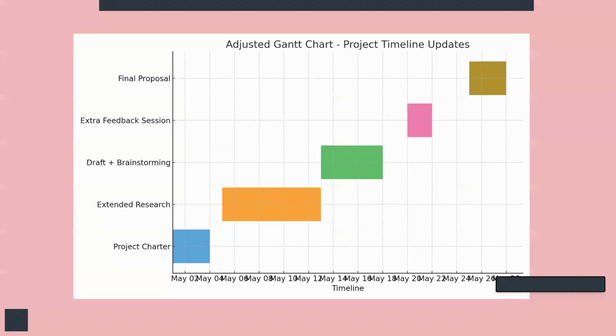The other factor that the Gantt chart contributes to is improved coordination. With the shared visual reference, communication became more efficient. We could easily see dependencies between tasks. For example, how a delay in content development might affect the event registration process.